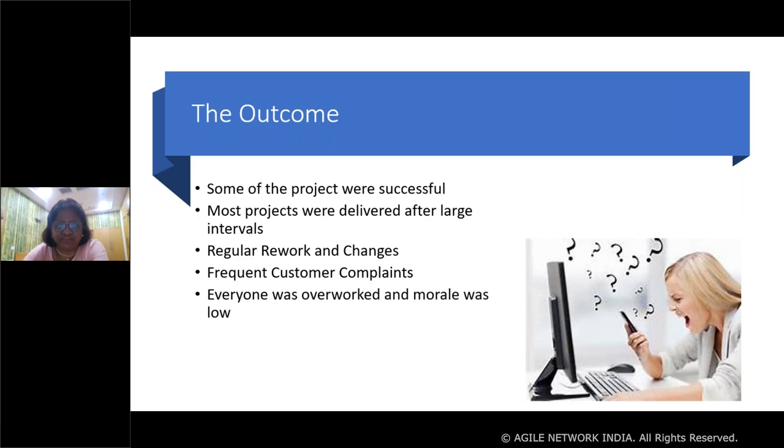So it was pointless to have those discussions when everyone was in a fighting mode. And also the team was overworked, and they had not taken vacations. They had been working day and night, and team morale was very low, and we started having a very high rate of attrition. And then this attrition actually increased our challenges, because when we inducted new people, we had to reskill them, and then we had to go through the knowledge transfer again. So on the whole, though we had some amount of success, in most of the areas we were challenged.